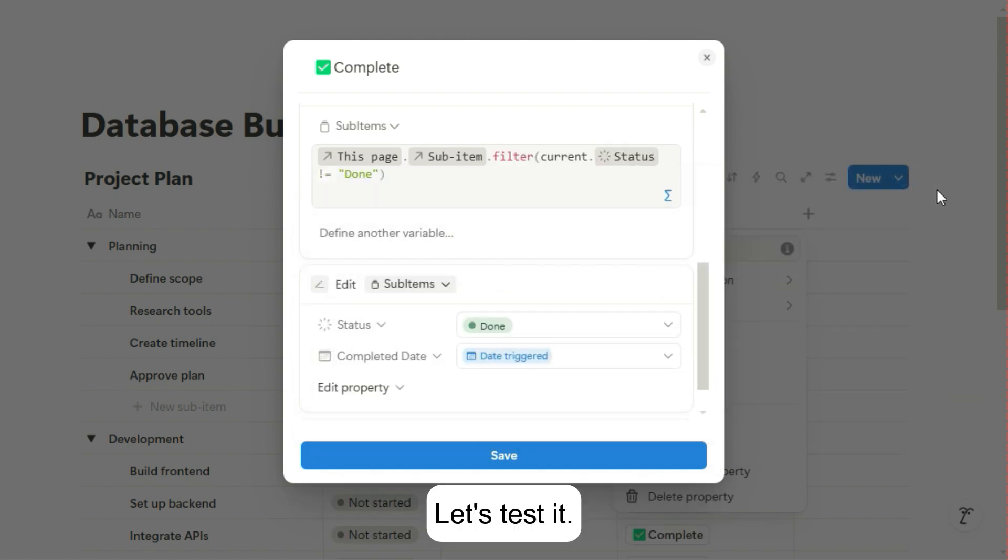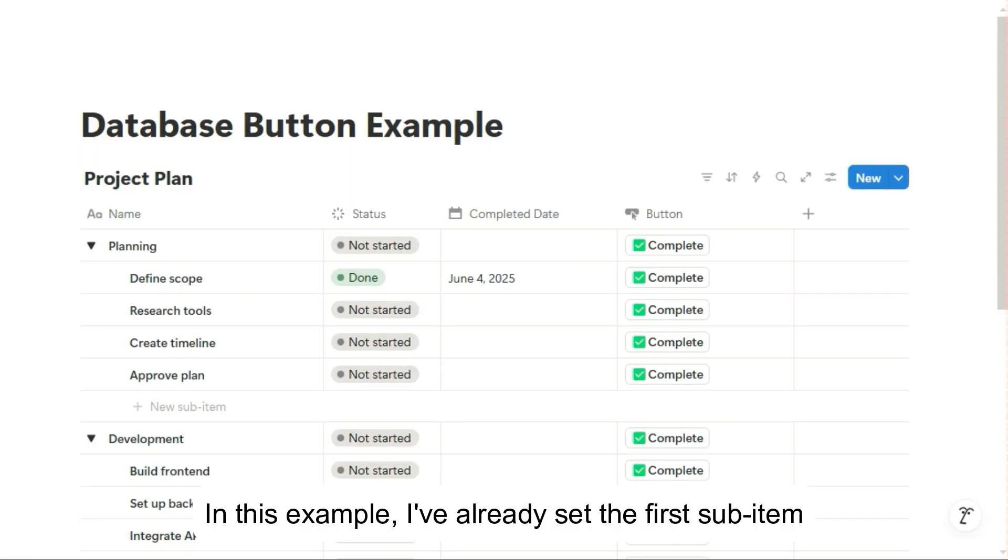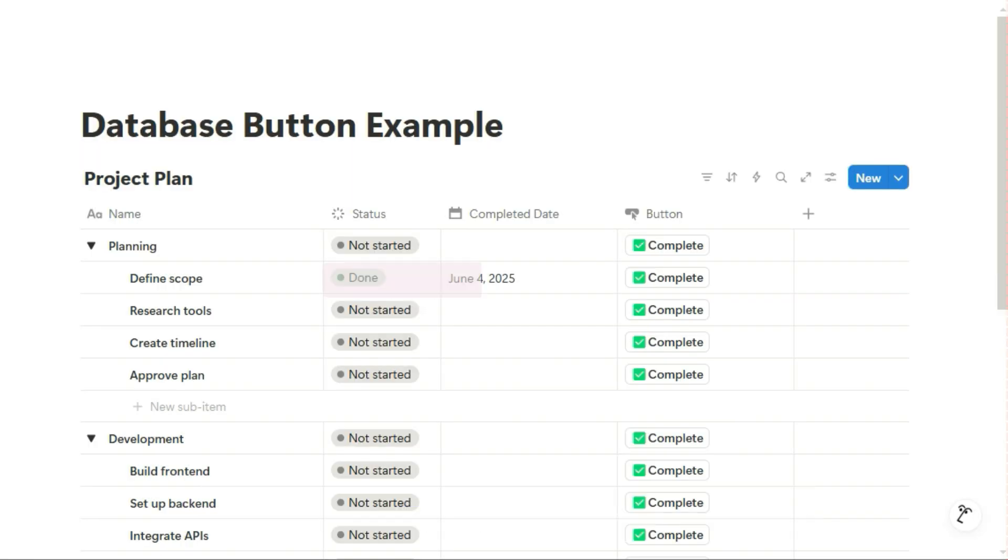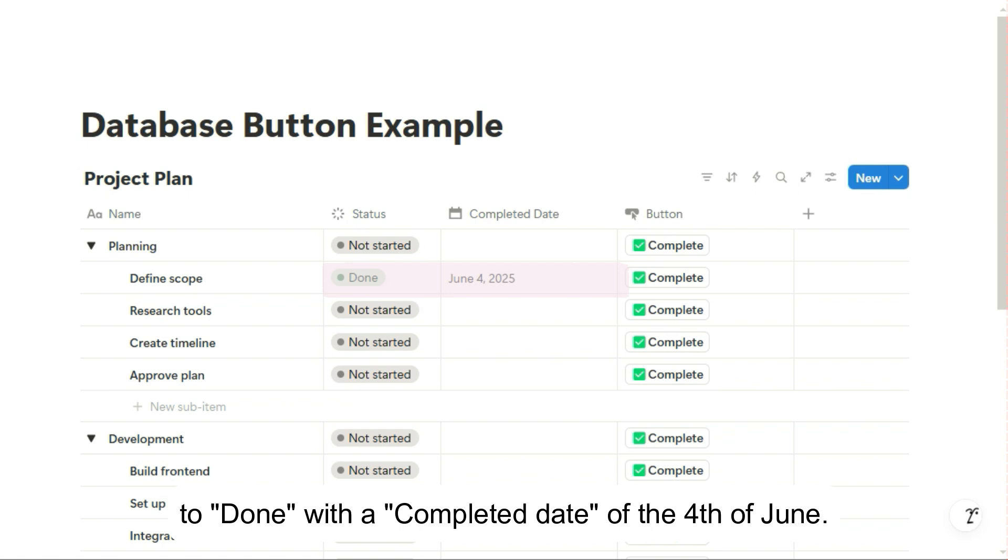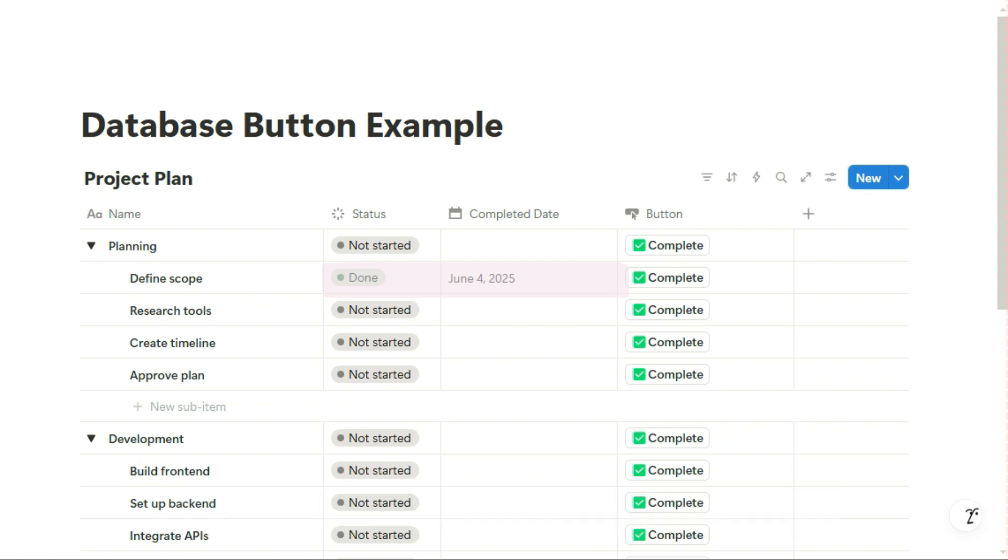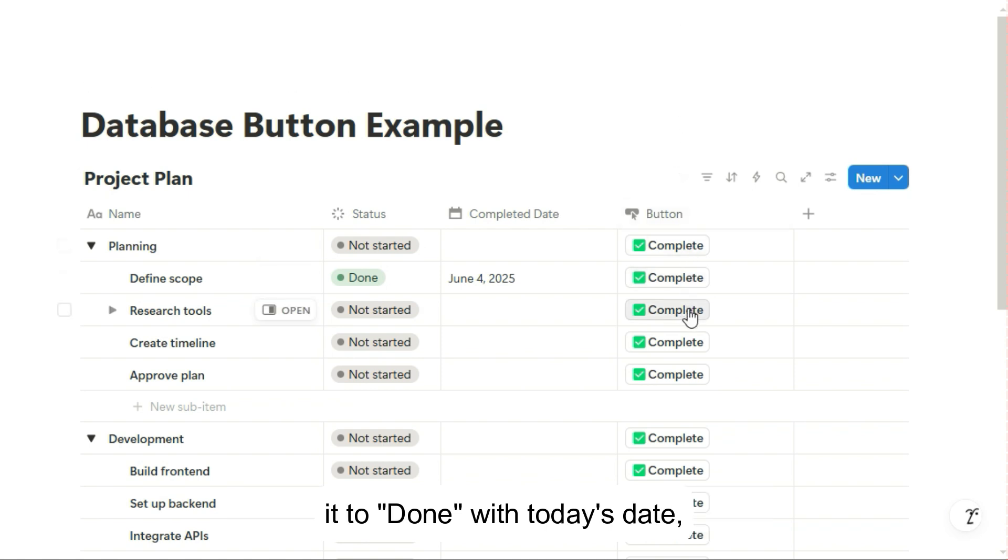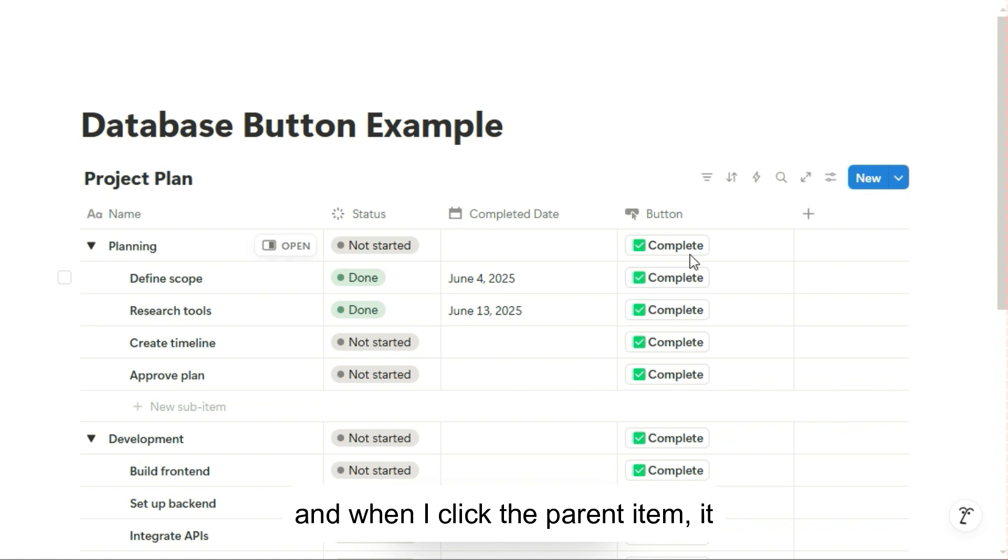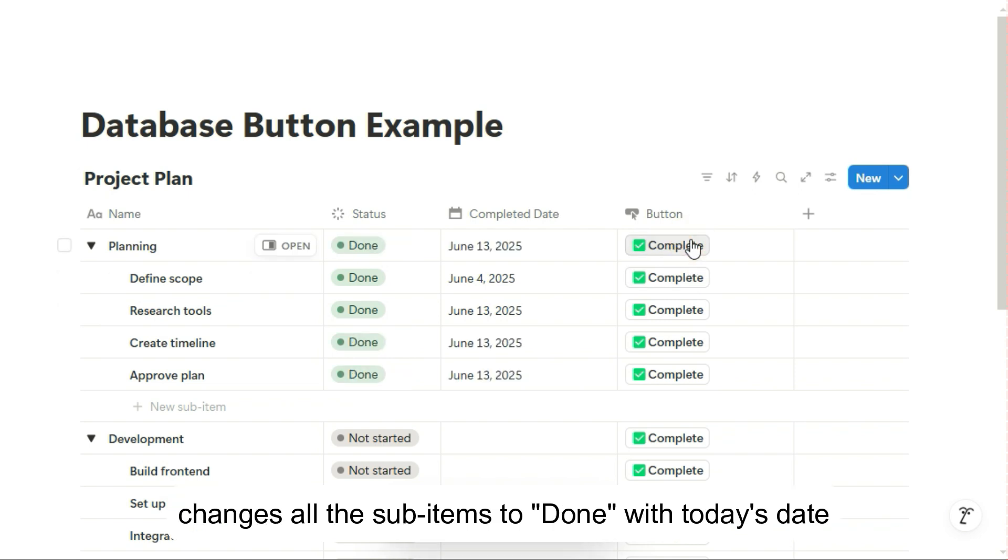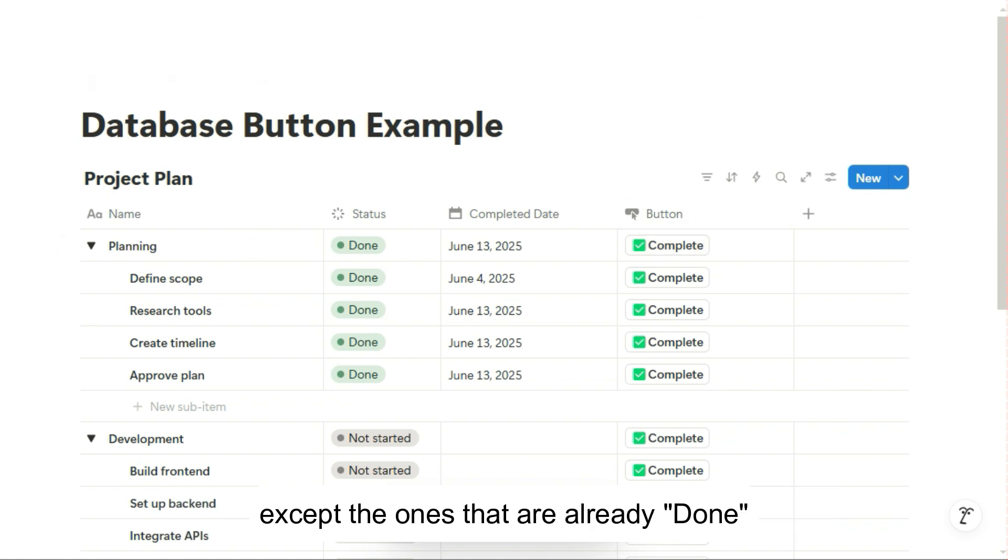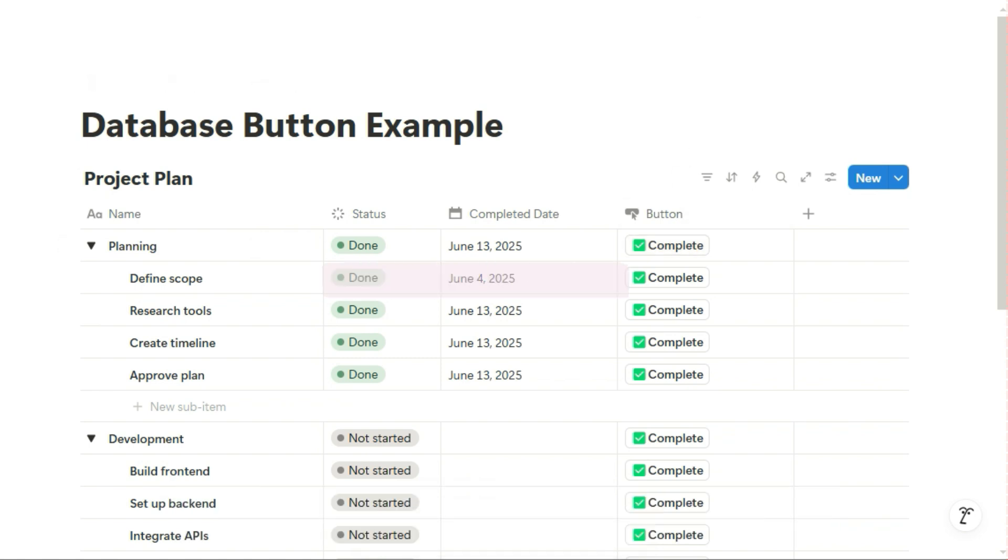Let's test it. In this example, I've already set the first sub-item to Done with a completed date of the 4th of June. I can click another sub-item now and it sets it to Done with today's date. And when I click the parent item, it changes all the sub-items to Done with today's date except the ones that are already done. So these remain unchanged.